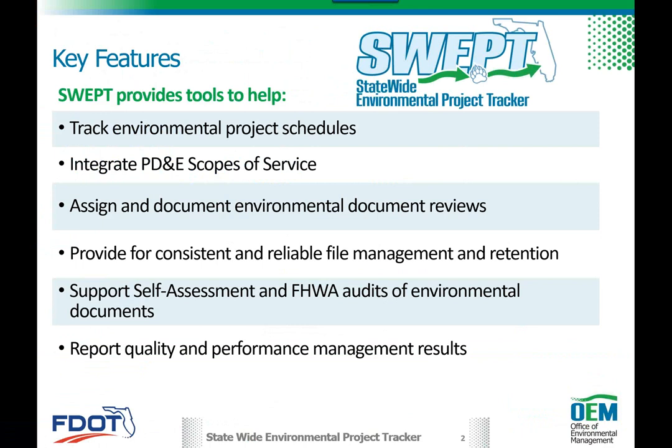Hopefully in the districts you guys are working through those various PSM codes, which is project schedule management codes, which are various milestones in the development of various PD&E studies or NEPA related documents, all the way from a start to some of the intermediate steps until the approval process. There's a separate webinar and a separate training on that as well that's accessible off our training site on OEM that gives an overview of PSM codes.